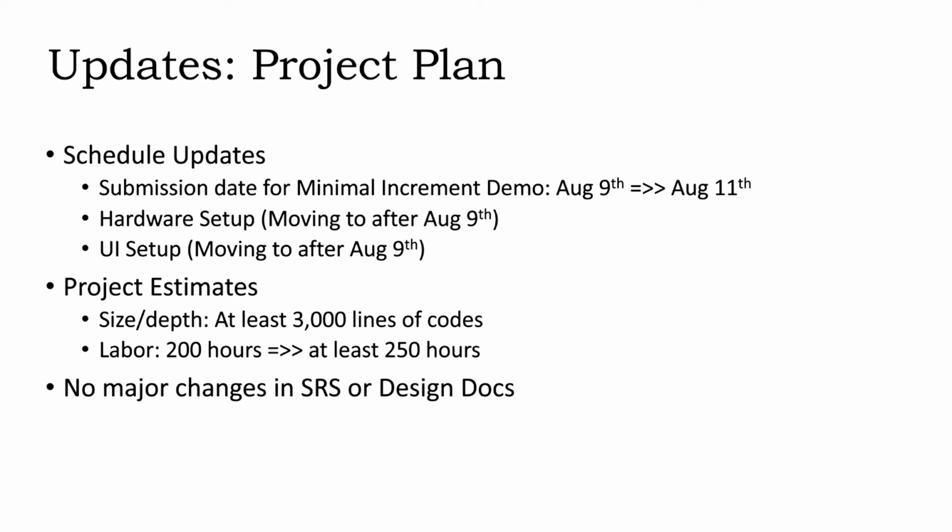Based on feedback from stakeholders for previous checkpoints, as well as effort expended by the team to date, the project plan has some minor updates that are not expected to create delays beyond today's demo. Due to the supplementary skeletal increment demo video submission on August 9th, the minimal increment demo needed to be postponed 2 days beyond the expected due date in order to properly execute both items. This also delayed the hardware and UI setups as resources were devoted back to the previous submission. Both hardware and UI setups are in progress as of today, August 11th.